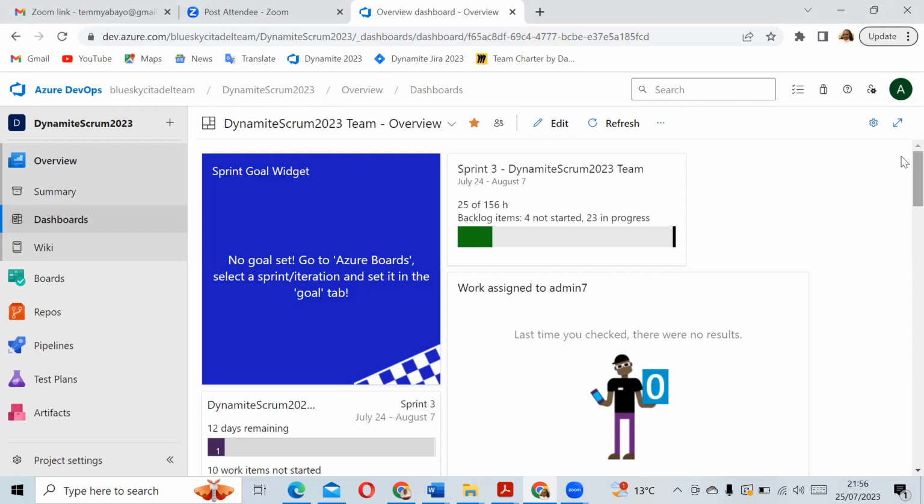So it's better for you to just reduce it, because I think what happened was you had loads spilling over from sprint 2 to sprint 3. And then you had a lot added again in sprint 3. Normally, if you have loads of stories spilling from one sprint into the other, you want to look at those first. Ask the PO, all these stories from sprint 2, are they going into sprint 3? If the PO says yes, and there are a lot of them already, this is where you as the Scrum Master negotiate with the PO in order to shield your team.